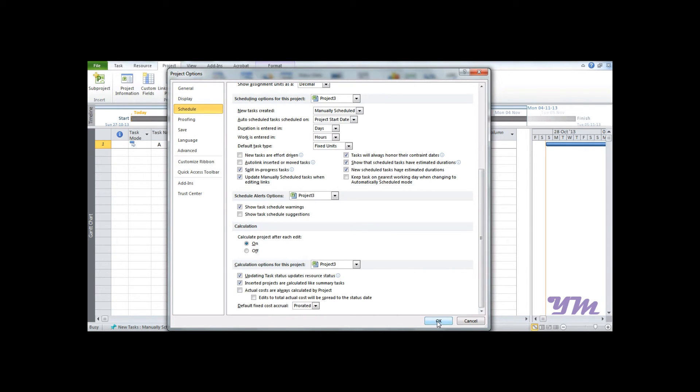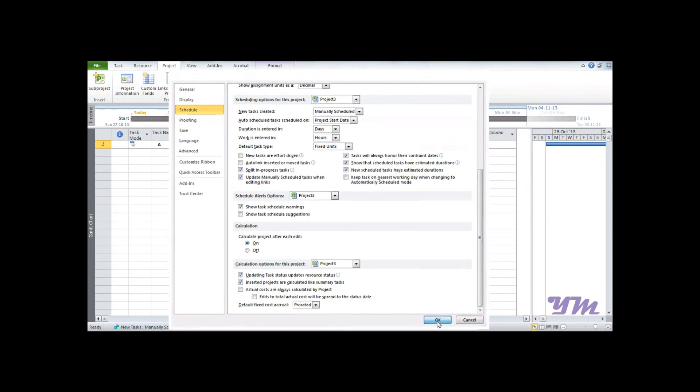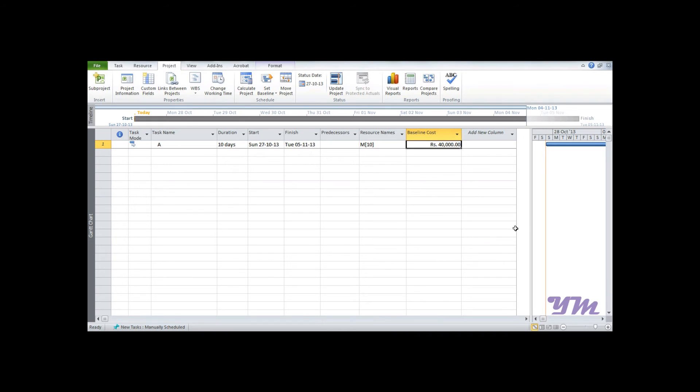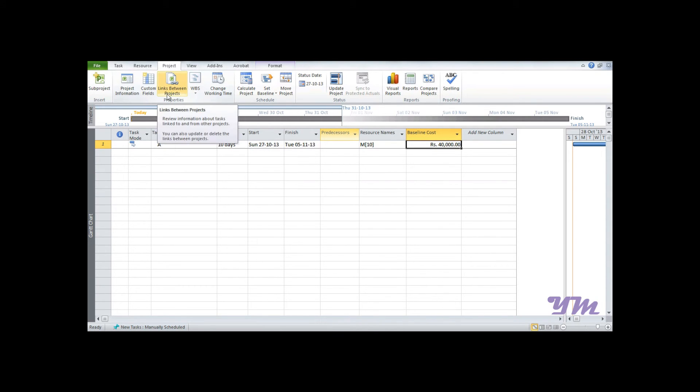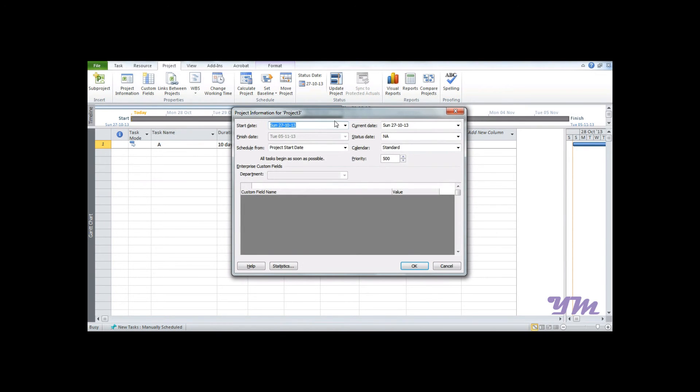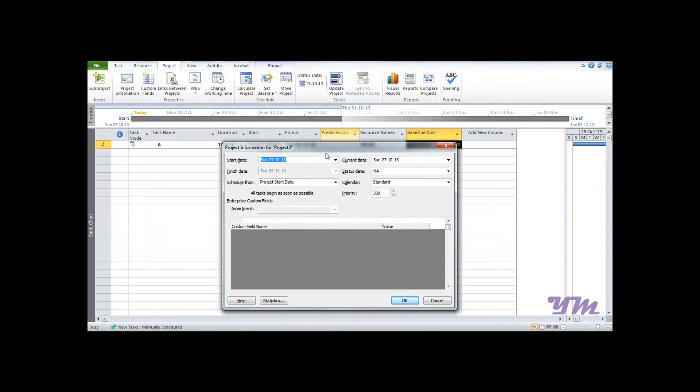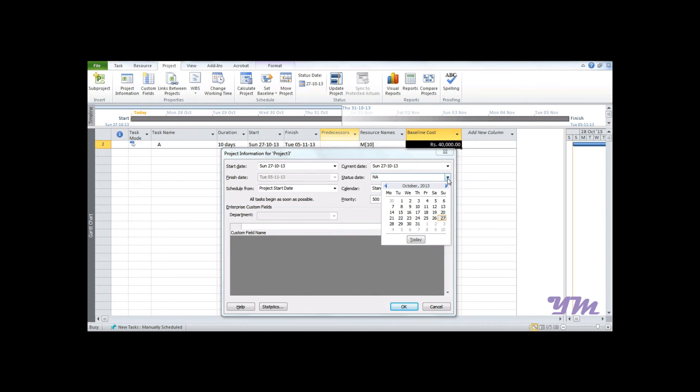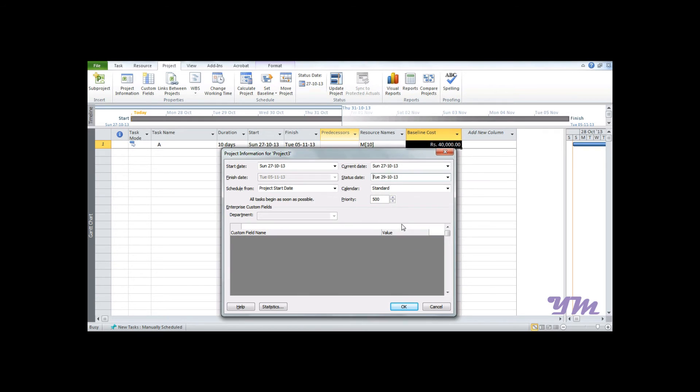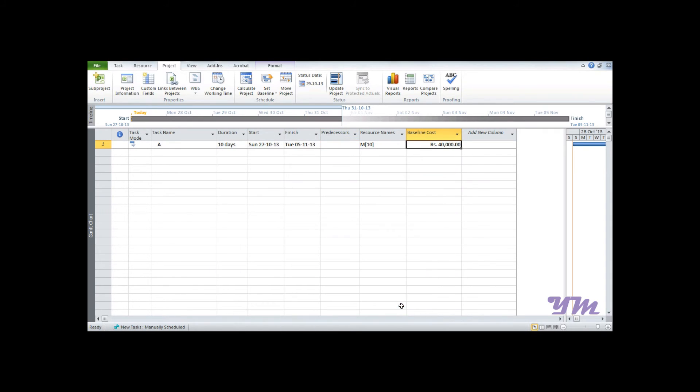Now let's set the status date. Status date is the date at the end of which you would like to know the status of the project. Let's say we want to know the status at the end of the third day. Being started 27 October 2013, we would set the status date as 29th because it's the third day, and press OK.